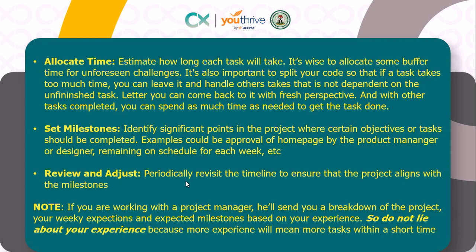Now estimate how long each task will take. It is wise to allocate some buffer time for unseen challenges. So actually there are some designs that a UI designer might give you for some things that are not even that much. For example, while I was building a project, this date pop-up, they also designed it. So to design the date pop-up to look exactly like the design took me, in short, the time it took me to design the full landing page, I spent close to that amount of time trying to understand how to design just that date pop-up.